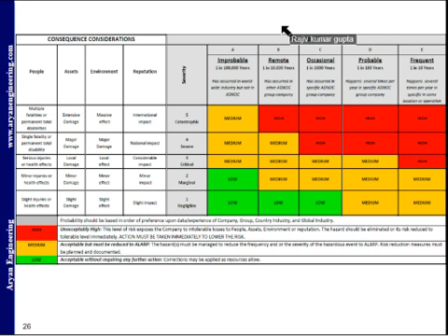It cannot be exactly 100% because then it would be a certainty, not a risk, and it cannot be exactly 0% or it would not be a risk. So the probability is always more than 0% and less than 100%.